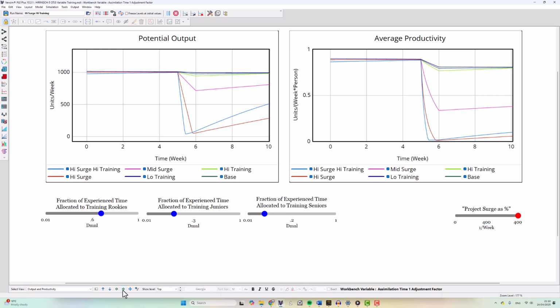The people on the project will respond to this. And they'll respond by cutting back the training they're giving. They'll make themselves less available to answer questions, set up user accounts, smooth over problems. The result is that you'll see some immediate improvement, and you can show that to your boss. And he or she is likely to respond by saying something like, "Good. Can we expect to see more improvement next week?"